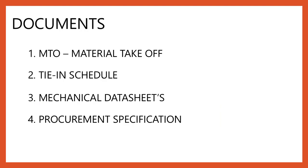Now let's go to the documents submitted in piping projects as part of a deliverable. The first document is MTO — Material Takeoff — which has a list of materials that has to be procured for construction. The second document is the tie-in schedule, which is a sheet that indicates a list of tie-ins, from where the tie-in is to be taken, with the schedule and the type of joint connections.